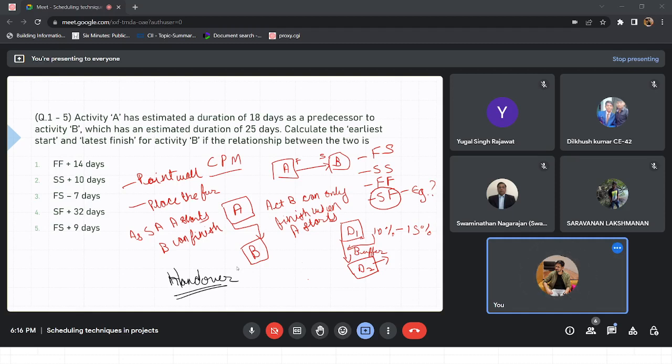So placing the shuttering is activity A and hoisting the shuttering is activity B. Only when the team at the 4th level is ready to handle this formwork will the hoisting activity complete, right? Are you getting an idea? Yes. So whenever there is a handover kind of situation, you will see this relationship quite often.